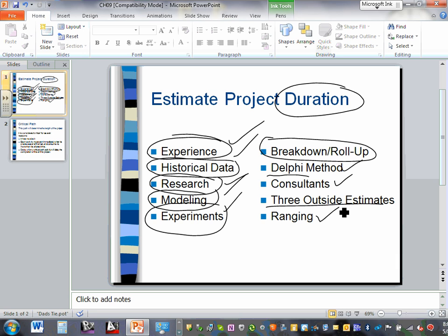So now, Derek, you guys are doing estimating for me, right? For us, typically, for the most part, we use experience and historic data. That's what we do. And can you add Accubit to it? Isn't that Accubit? That's where your modeling is. When you do modeling, I have software that can tell you I assign half an hour for each fixture, and if my rate is 69 an hour, I can tell you how long it will take you to install this fixture. Our estimating software can give us the duration for this project, guys. If each one of these fixtures is half an hour, and I have 10 of them, now I'm looking at 5 hours, right?